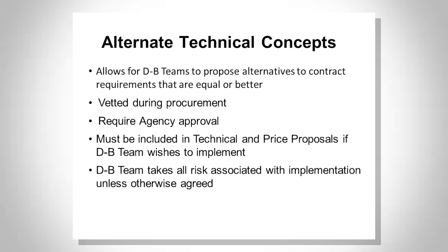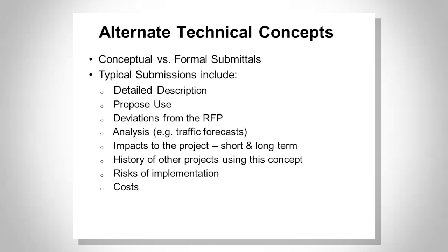Must be included as part of the technical and price proposal if design build wants to implement. So again, if you want it, you got to document it. Design build team takes all the risks associated with implementation unless otherwise agreed. So that's where you may or may not want to pay a stipend for it. So the idea is consider whether you want a conceptual submittal or a formal submittal. Again, that's a criteria that you get to establish.